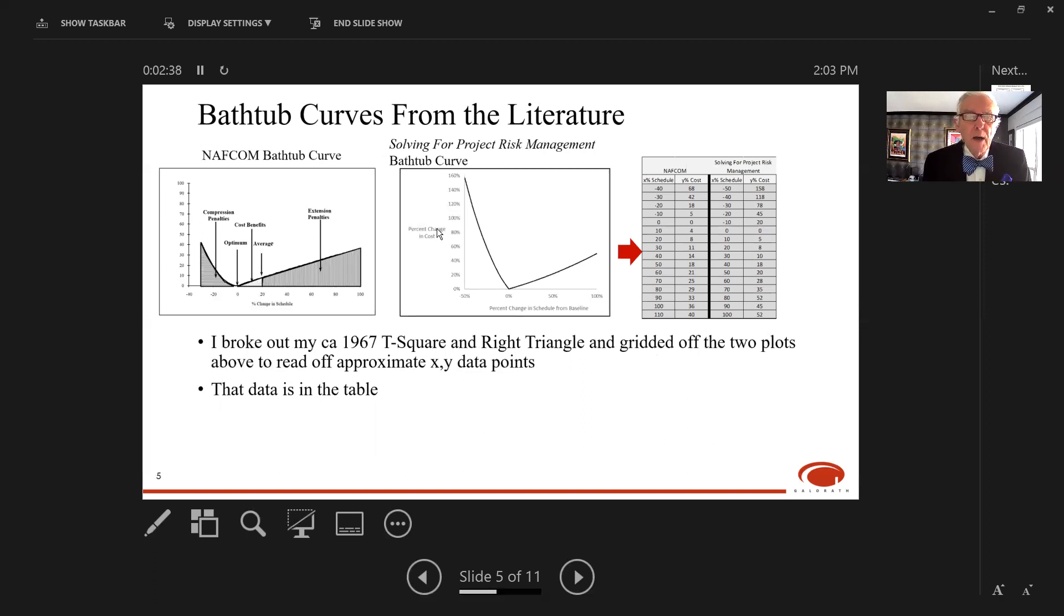I took the two curves and used my 1967 T-square and right triangle to grid off the two plots, which allowed me to read off the approximate XY data points corresponding to these curves. Those data points are shown in the table on the right. For example, the first data point for NAFCOM is minus 40 percent schedule, a 40 percent compression, predicting a cost penalty of about 68 percent. For the Solving for Project Risk Management curve at minus 50 percent schedule, it predicts around 158 percent cost penalty.